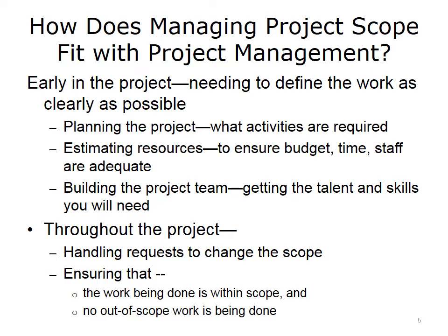Make sure you have the talents and skills on your project team that you really need based on the project requirements. In an HIT project, clinicians often have wonderful ideas about how to make the project better. But are they in the original scope of the project, or are they just add-on pieces that will add more work to the project but not make it better? Each of these ideas will have to be analyzed, defined, and either accepted into the project with a scope change statement or rejected.